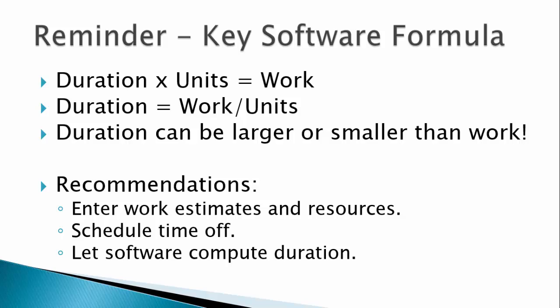Review how the work was assigned, and if the duration is what you expect, just retype the number and the question mark will disappear. There is an option to turn this feature off. However, I recommend you use this as a form of review checklist when you have completed your plan and before you create a baseline so that you look at each task and make a decision about the duration. By the way, if you make the duration longer, you may run into resource overallocation issues with overlapping tasks.